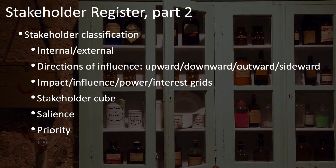The stakeholder register should also include some classifications of the stakeholders. Stakeholders can be classified as either internal or external to the organization. They can also be categorized based on their directions of influence: upward, downward, outward, or sideward. Stakeholder analysis can look at the impact, influence, power, and interest of different stakeholders and map these out on grids, in stakeholder cubes, or in salience models, and then prioritize these stakeholders based on those that need the most attention from you as a project manager.